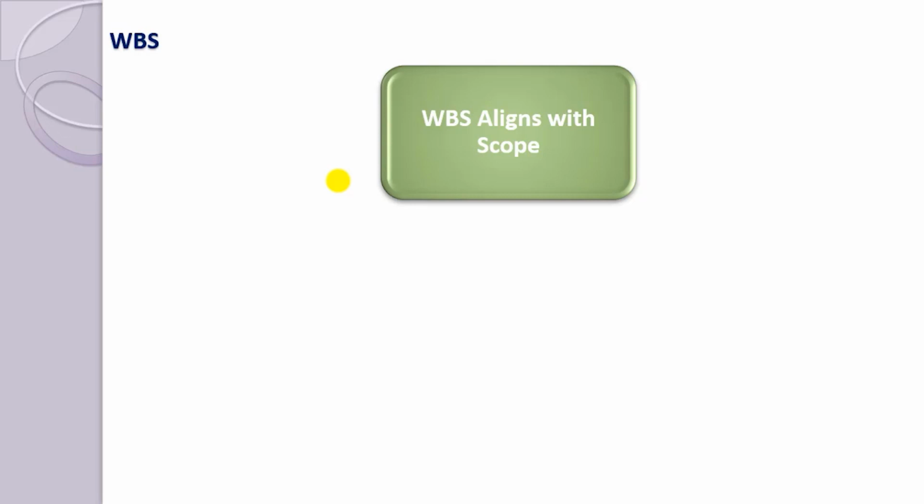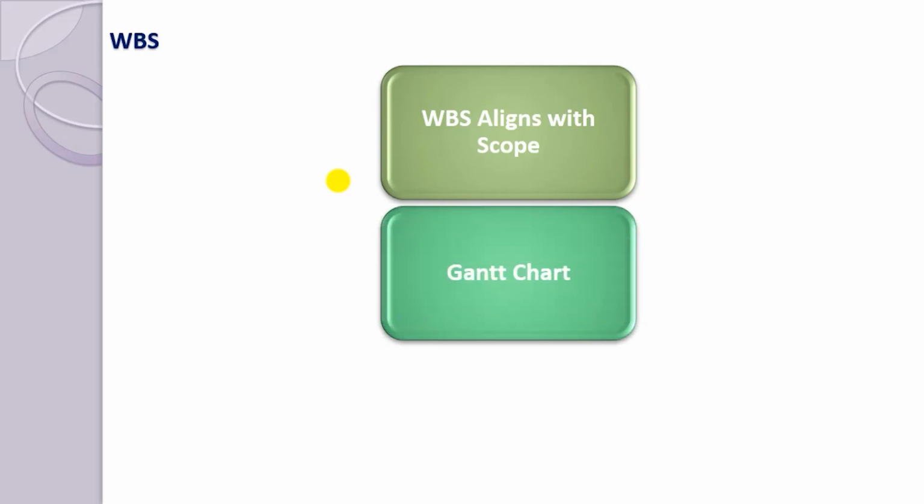Equally, you don't want to plan milestones that take mere hours to complete, for example 2 hours or 3 hours. We can't include those in the WBS. It will be difficult to manage, and it will also affect your personal productivity as a project manager or team lead to track things on an hourly basis. A WBS can be represented in a number of ways.